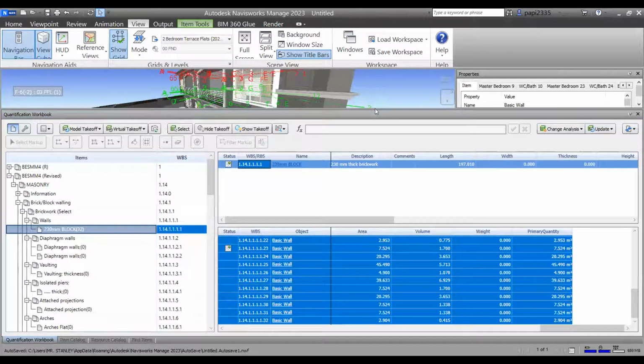This trick I just mentioned, people are working around it. You will see somebody finish taking off, and because there are new changes, he has to start deleting all he has taken off before doing a fresh takeoff, which can be very cumbersome. But the workaround is simple. Select all of them, do the analysis, identify what has changed.